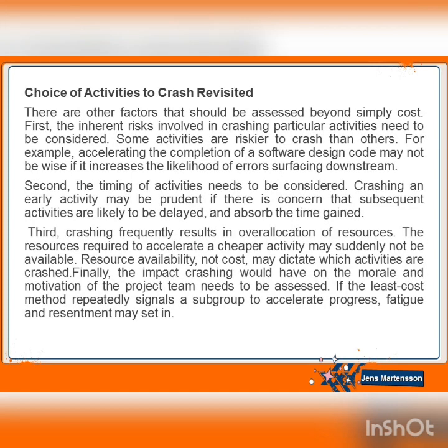There are other factors that should be assessed beyond simply cost. First, the inherent risks involved in crashing particular activities need to be considered. Some activities are riskier to crash than others. For example, accelerating the completion of software design code may not be wise if it increases the likelihood of errors surfacing downstream.